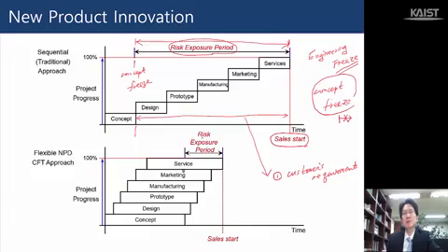It might happen that during this period of time, because of some unknown factors, because of some unknown events, people change their taste, and red becomes more popular than yellow. So during this period, customers' requirements and needs changed, but the company cannot incorporate that change into its new product because they already froze everything there.